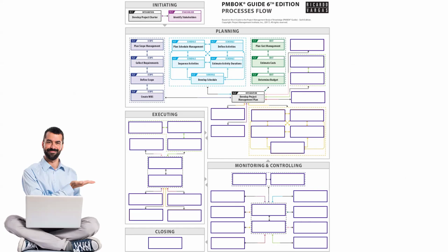Now the question is, when do we baseline the scope? As soon as the work breakdown structure has been created. We present that work breakdown structure, scope statement, and work packages to the boss, and when they agree to it, that is a go-ahead signal that we can now proceed with scheduling and costing and all other work. So scope is the first baseline which is created.